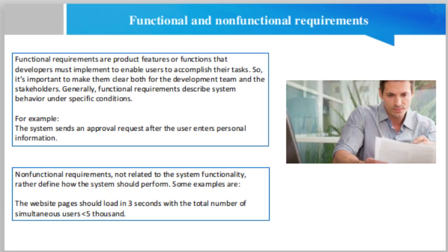Finally, all user stories must fit the INVEST quality model, that means independent, negotiable, valuable, estimable, small, testable. Independent means that you can schedule and implement each user story separately. This is very helpful if you implement continuous integration process. Negotiable, this means that all parties agree to prioritize negotiations over specification. This also means that details will be created constantly during development.